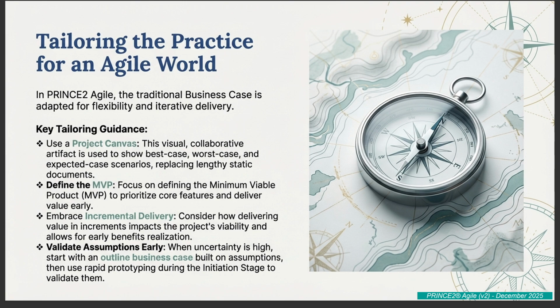Brilliant. Third guidance point. Embrace incremental delivery. This is the engine that keeps the business case alive, right? It is. When you deliver value in frequent releases, you get earlier benefits realization. The moment a benefit is realized, even a small one, you can update your forecasts. This has a huge positive impact on the viability assessment and makes it so much easier to justify the next increment of work. You're constantly feeding the justification. And the final point is to validate assumptions early. The first business case is always full of assumptions. Always. About users, about the market, about the tech. So you use rapid prototyping, maybe the discovery phase during initiation, to test the biggest unknowns before you commit the full investment.